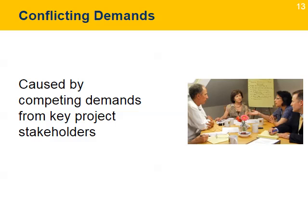Conflicting demands. Key stakeholders with high influence in the project can create conflicting demands through requests for changes and access to resources. This creates conflict with team members who may want to satisfy the needs of the stakeholders. For example, a stakeholder might request changes in the scope of the project; while the request might be valid, it will add more work to the team. Project leaders can help resolve this conflict by communicating to the team and key stakeholders the process for change requests and other requirements from the team.